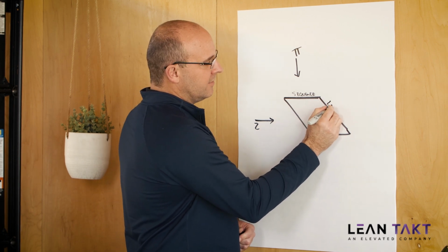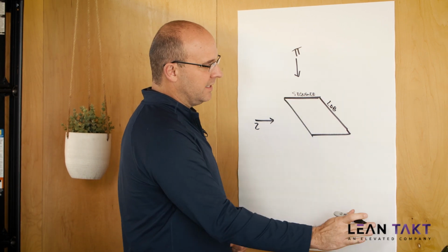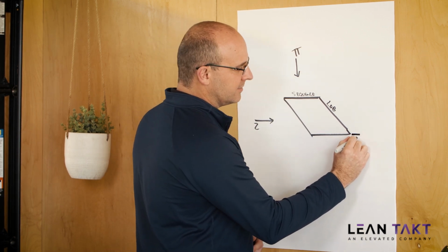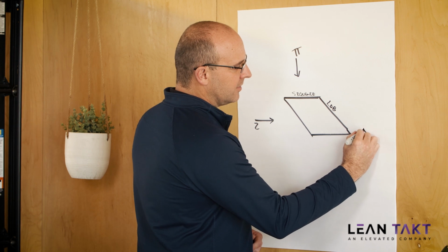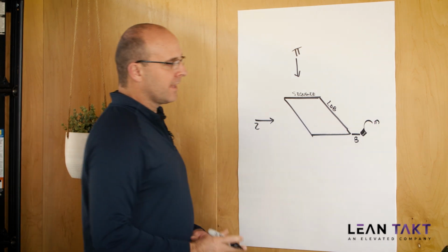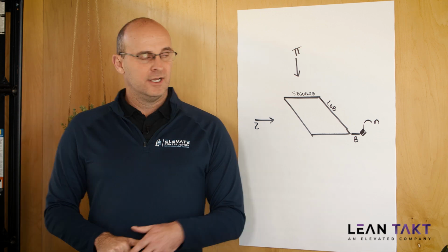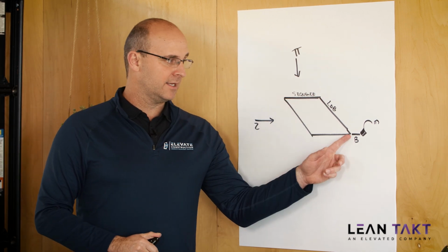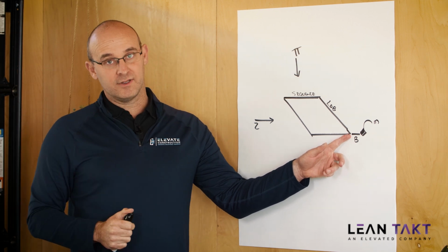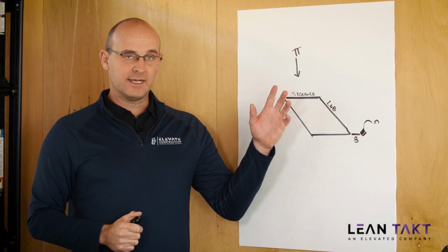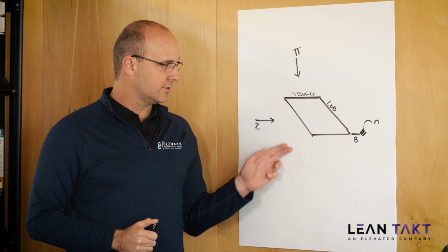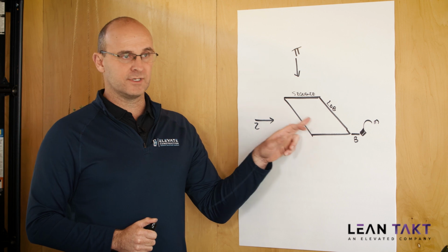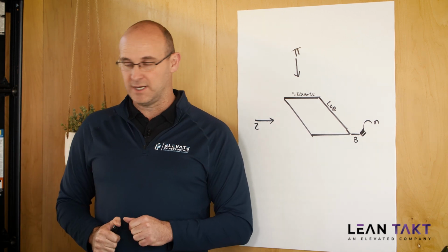But it will also have a line of balance, meaning this is the speed at which the phase and the train is going. At the end, you'll always have a buffer. The end of the phase will always have a milestone. With this phase, we can always validate the sequence with a pull plan. We can always validate the line of balance with our calculator on the LeanTakt.com website, and that calculator will tell you, according to different zoning strategies, how fast you can go. You'll always have a buffer which absorbs the risks of the phase, and that targets the milestone.